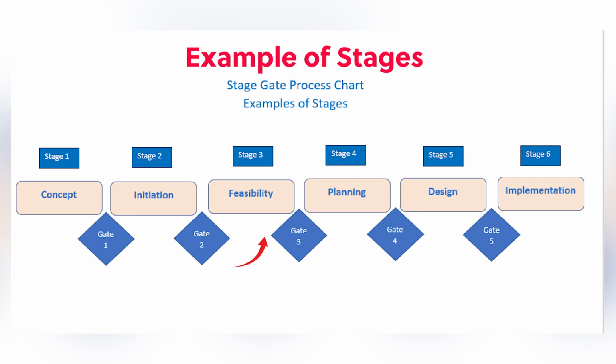But they have to approve those deliverables before you can go on to the next stage. So it could be that during options analysis, they're not really happy with some of the numbers that come out, because during a feasibility phase, you have to put some sort of costings against it, timelines. So maybe they're not happy with something that comes out of it, in which case you have to go back and redevelop what you've done.